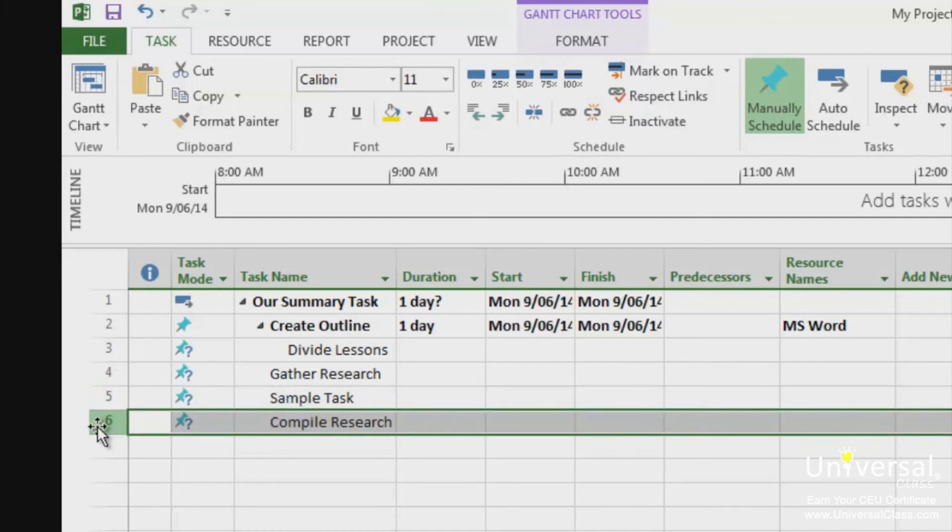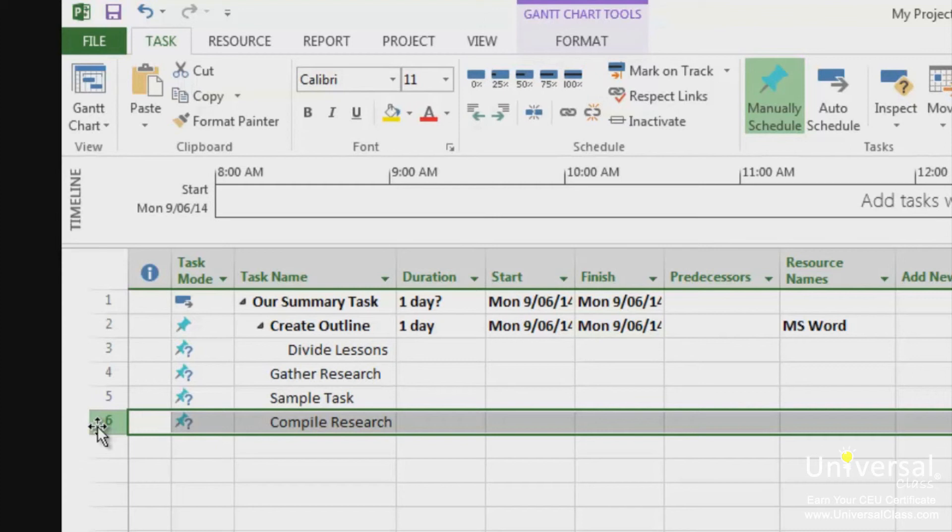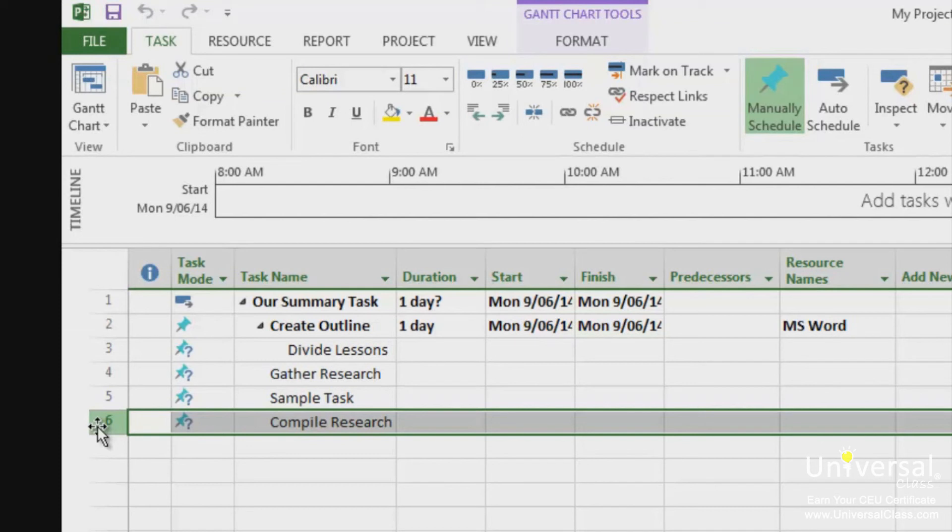The WBS code, or Work Breakdown Structure code, is simply a code that is applied to your outline of tasks that makes different elements of your project easier to identify. These codes are automatically generated for you, so that each task has a unique identity based on the order that appears in your project. Here's an example. The second task in the second phase of a project has a WBS code of 1.2.2. This means that the task belongs to the first phase, as all tasks do, is in the second phase, and is the second task.